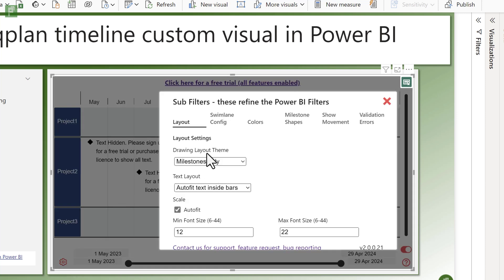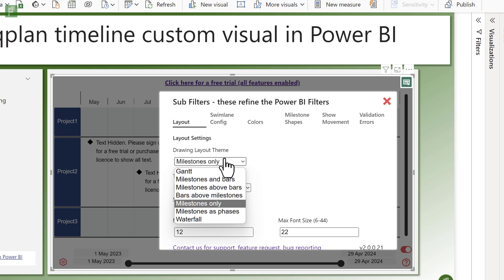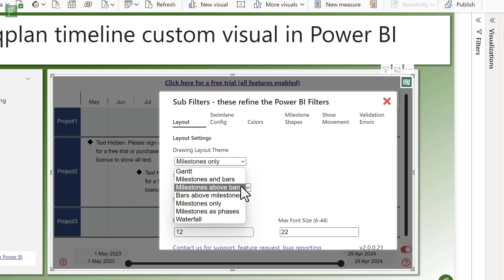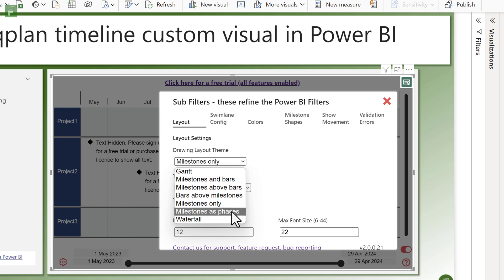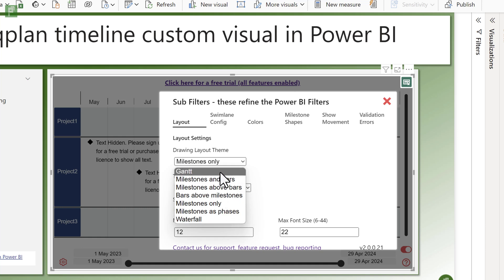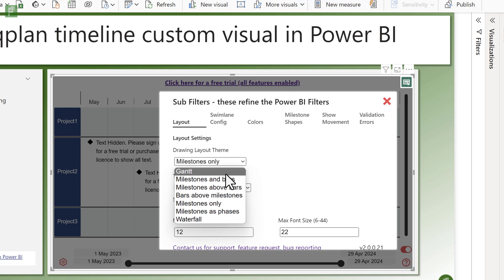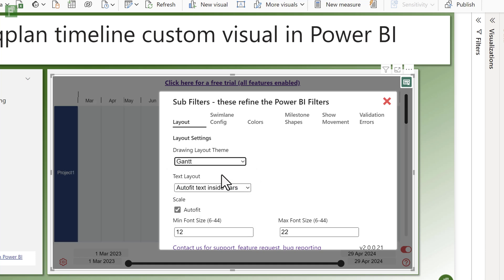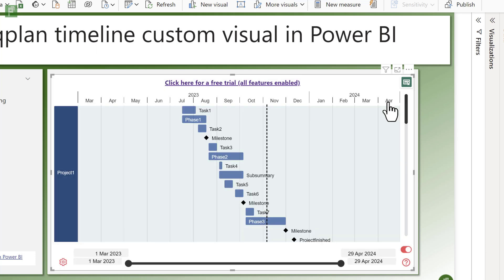And if you have a licensed version of the product, I can imagine that this is a very nice visual for your project milestones. Now let's return to another view of the layout. So we have drawing layout schema, our theme, and we have the Gantt—milestones and bars, milestones above bars, milestones only, milestones as phases. I don't typically think this is a good idea, but that's personal maybe. Then there's a waterfall, which mimics the Gantt where every line has its own row or every entity such as a milestone, a task or summary has its own line. But in waterfall it tries to compact that a little bit more. So let's look at the Gantt view. And here we see that very nicely reflected.